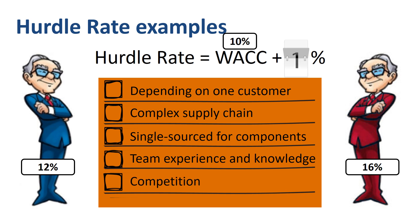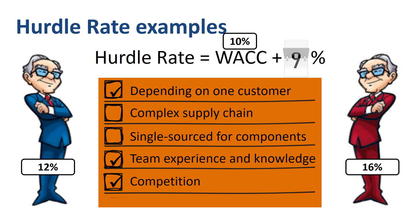For project A, the first, fourth, and fifth risk items apply. Some of these can be remedied — for example, the company could put a stronger team together to lead the project, which will reduce the risk. That's a trade-off between resources and risk.